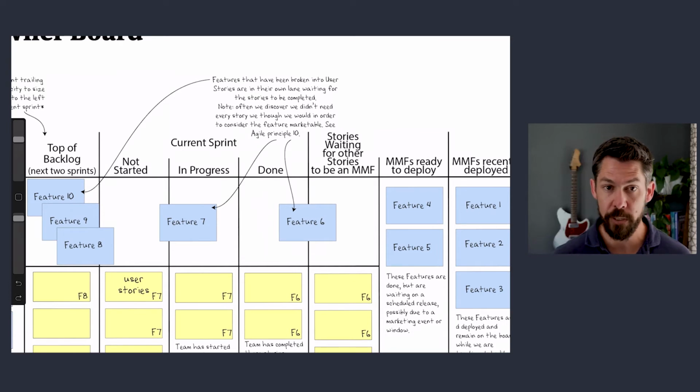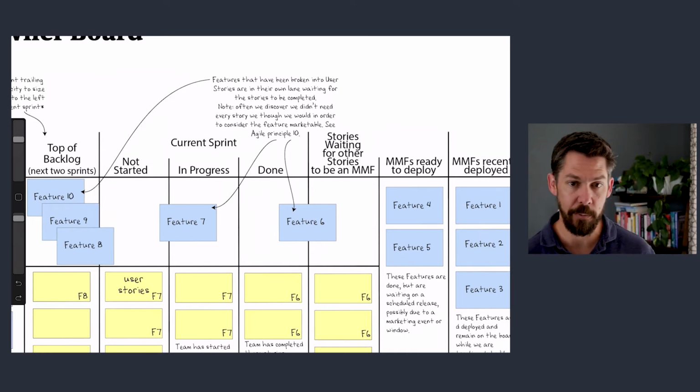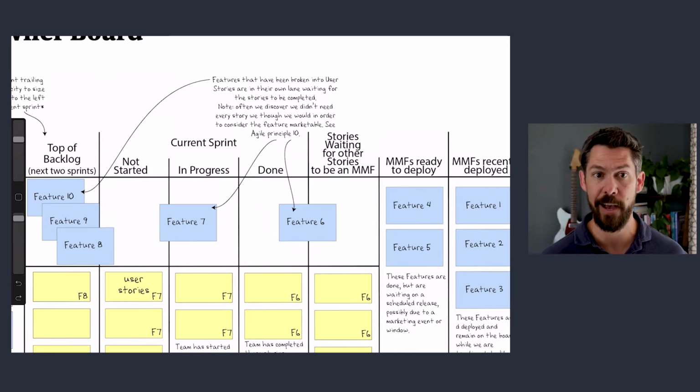In Scrum, the place where you would plan out that day's collaboration, of course, is the daily Scrum. And we're asked sometimes if product owners should be in a daily Scrum, and our answer is yes, absolutely, because one of the things you're doing is planning how you're going to collaborate today on items in the current sprint, and also how are you going to work together to get items to the left refined today. So that's current sprint in progress.